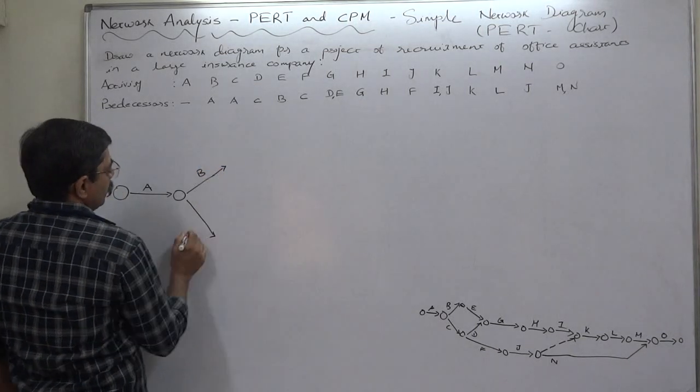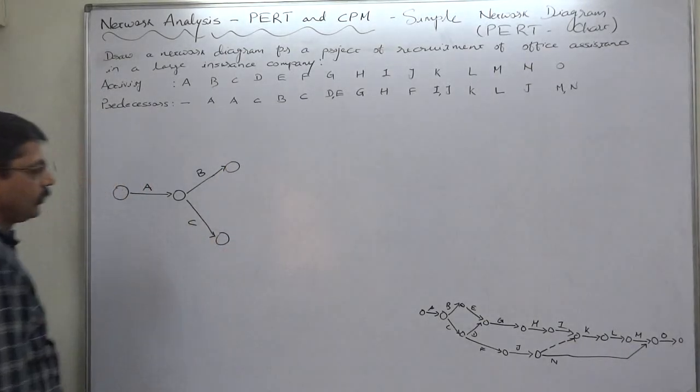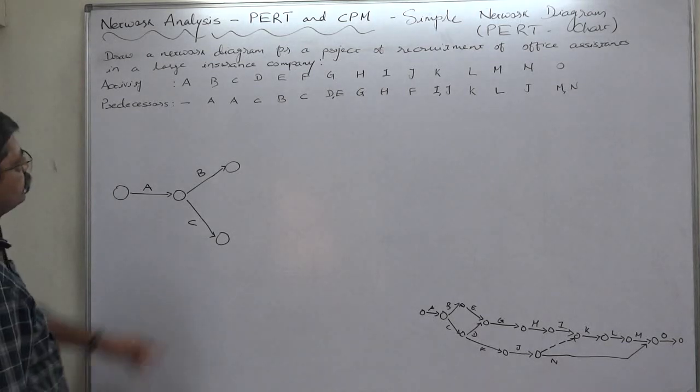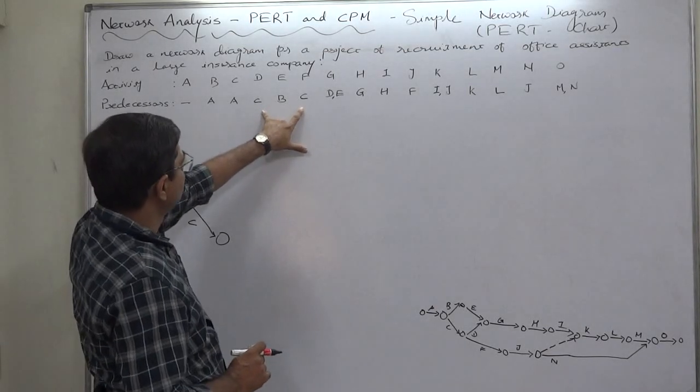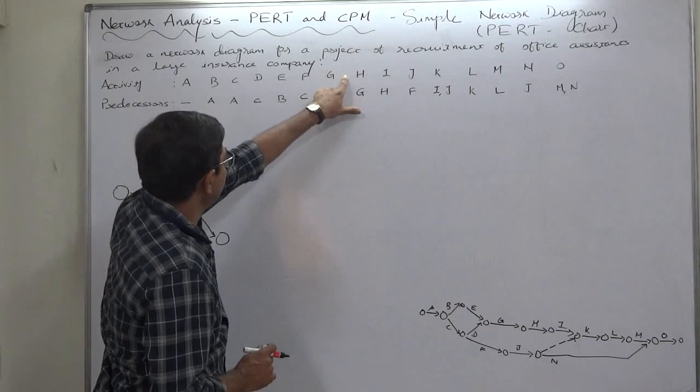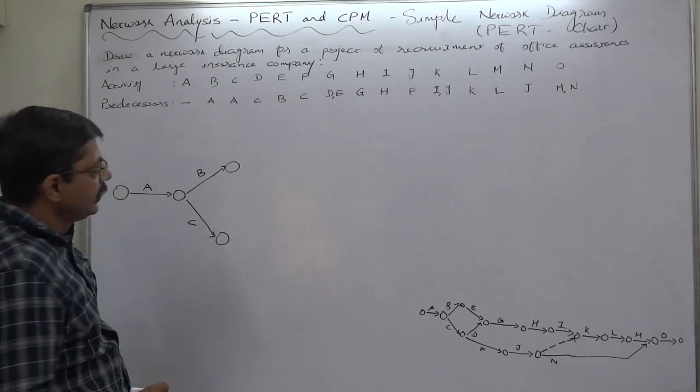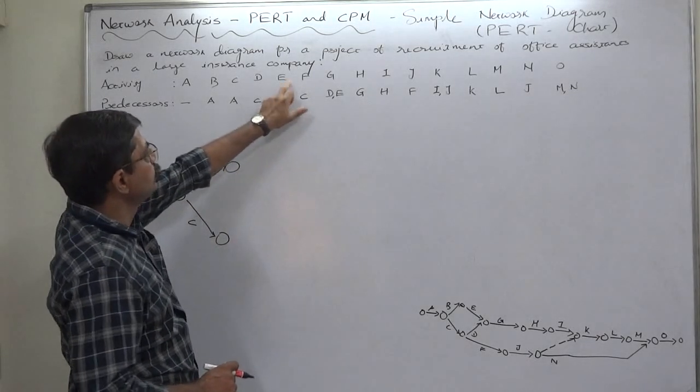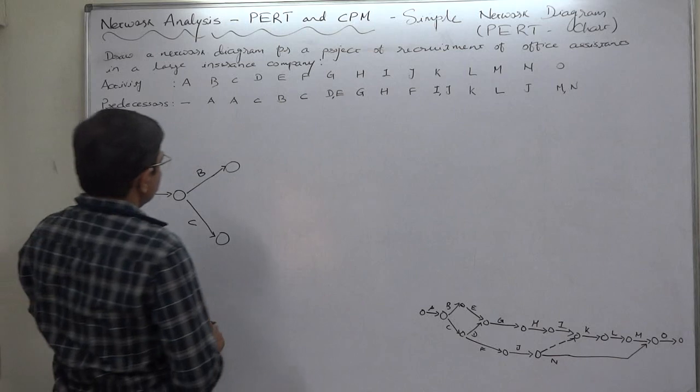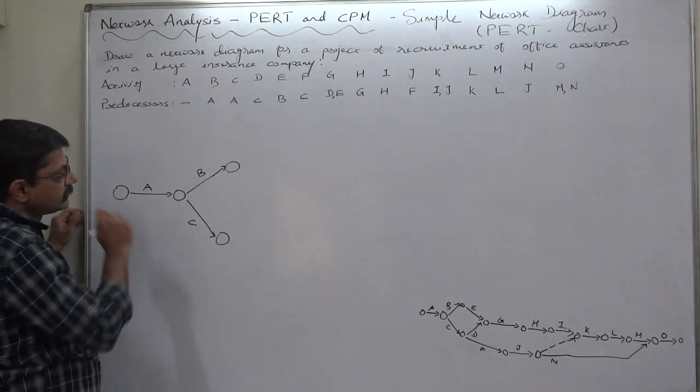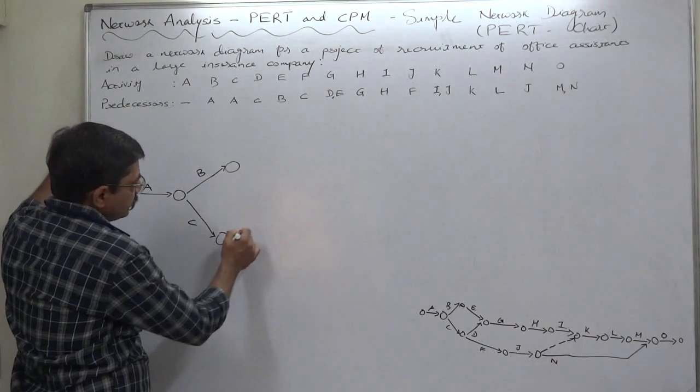Now take care because from C there are two activities D and F. D again meets E to start G, so it should be drawn in such a way that we can merge D and E to start G. And for that purpose it becomes very critical to draw D on upper side or lower side.